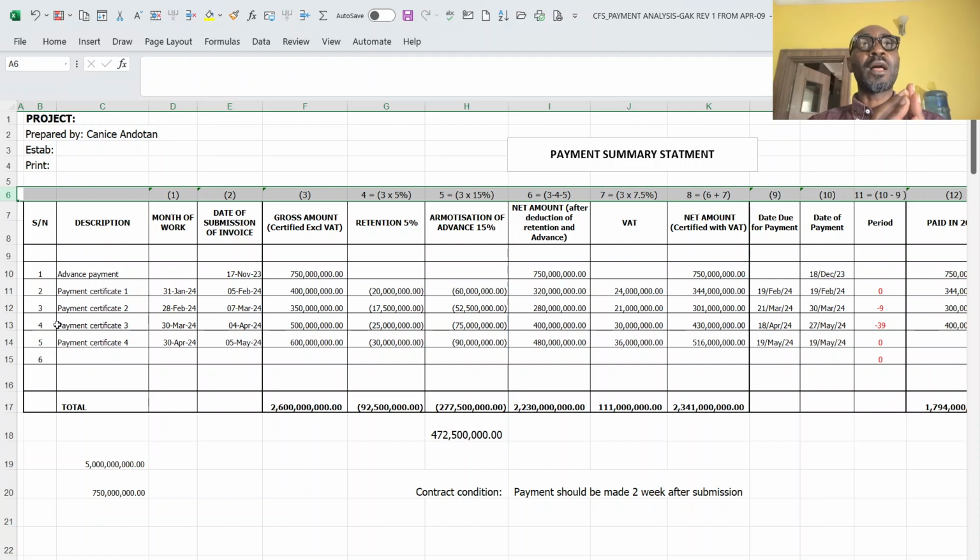And in the context of Nigeria, it's always referred to the NIBOR rate, which is gotten from the central bank's website. How this rate is computed is that some A-list banks in the country submit their interest rates.